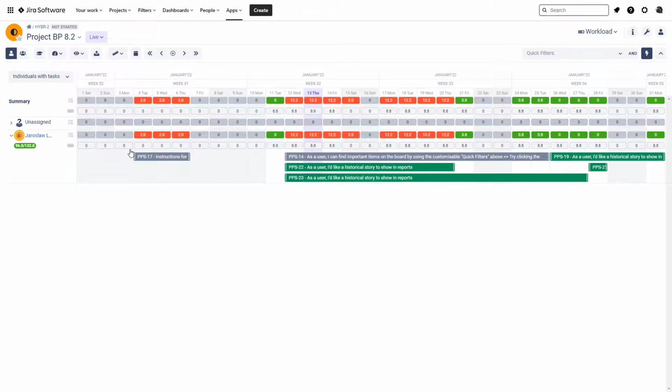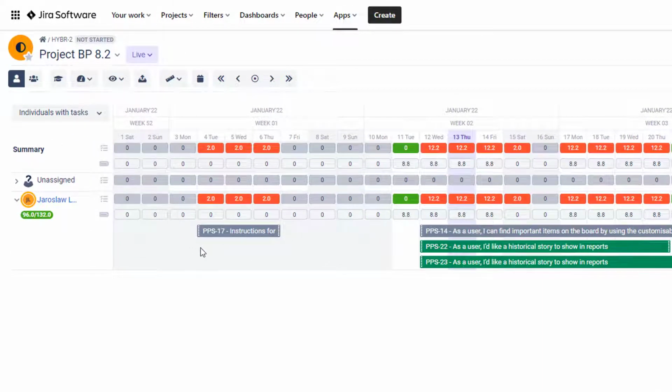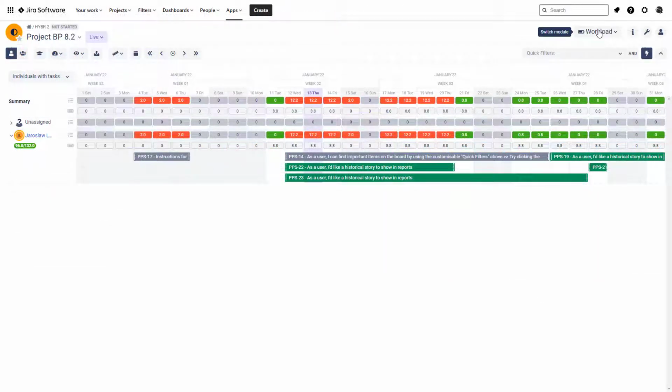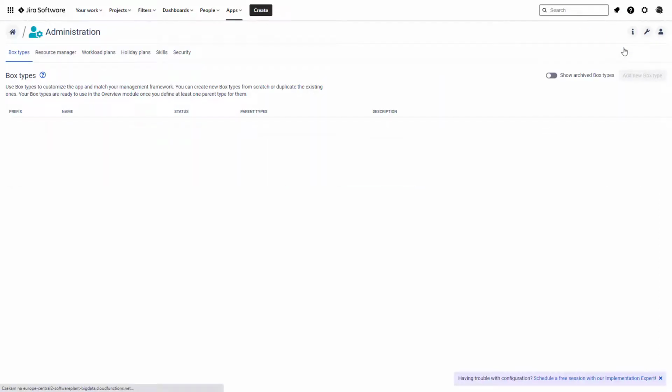Working with tasks that are assigned to people that have no working days in a period where the task duration is has also been a little bit flawed in the past. Now it's showing properly the breakdown of hours over here, highlighted in red to indicate that there is definitely something wrong with this task because it's assigned to Yaro, who is basically not working on our project inside this time period. So this task is highlighted in red to indicate that it's wrong. It should be assigned to someone else, or we should make sure that Yaro is actually working in our project during this time frame.